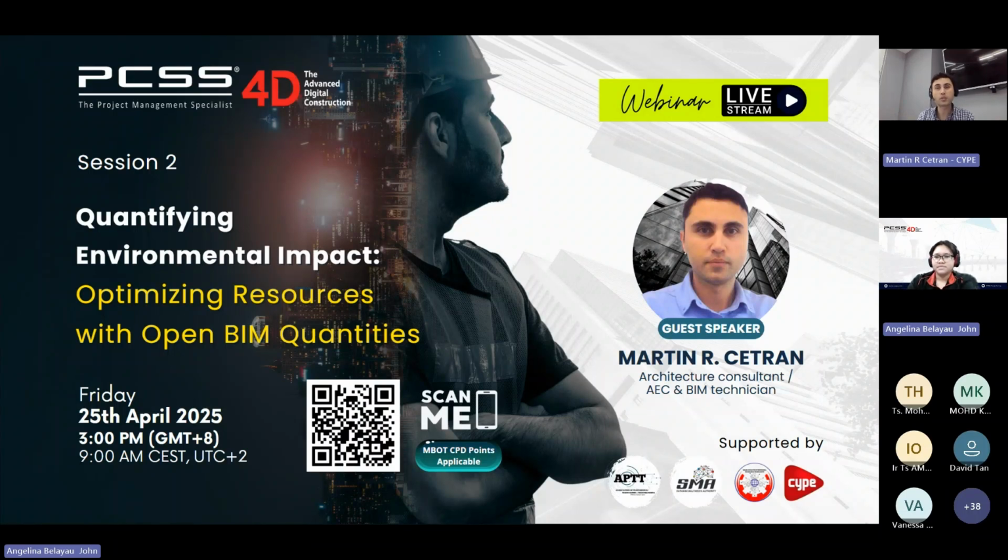It's not the case. What we have to do is simply send the change of the model into BIMserver.Center. I mean, just resend the model into BIMserver.Center, and then from the Open BIM quantities, just read the new model with the new geometry. So we just need to update from within the Open BIM quantities to read the new model, and then in the BOQ part of the program, click update the quantities again, and the program will measure the new model again, and that's it.